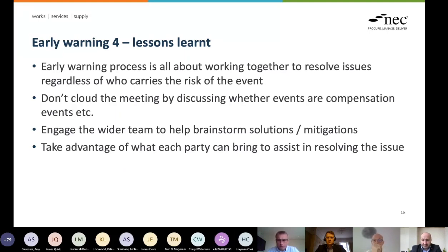I would answer and say that anybody can call an early warning meeting at any time on any issue, as early as possible, really, I guess. It doesn't have to be an issue that's happened. In fact, it's often better if it's something that hasn't yet happened and you can avoid it happening. So there's no set point at which it moves from a general communication to an early warning. I think the answer is that parties should call an early warning meeting whenever they are worried that something is happening or could happen that could adversely impact the project, as the contract prescribes.